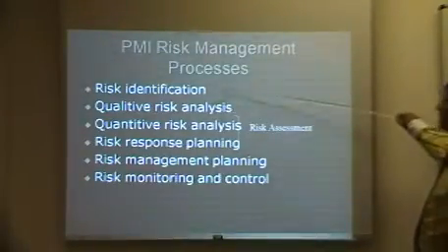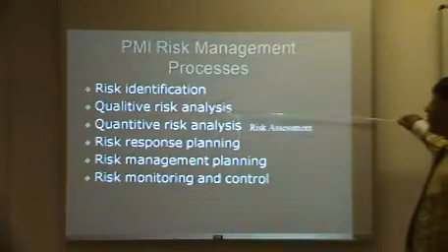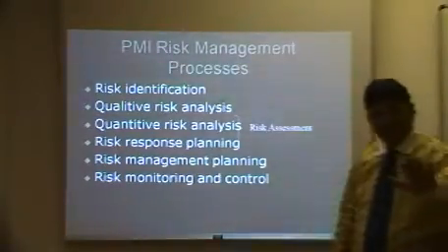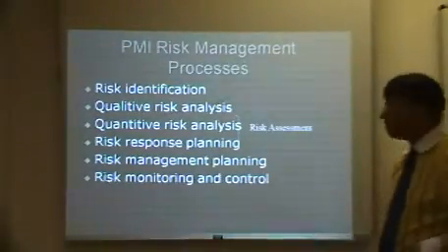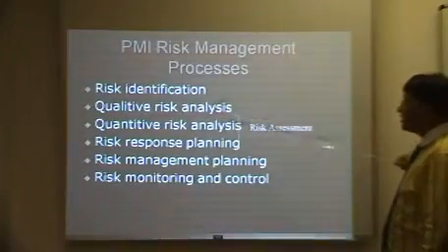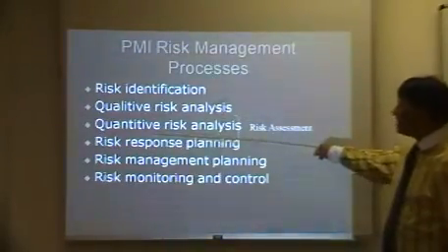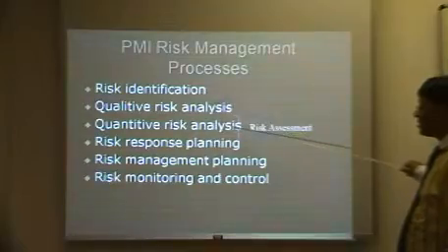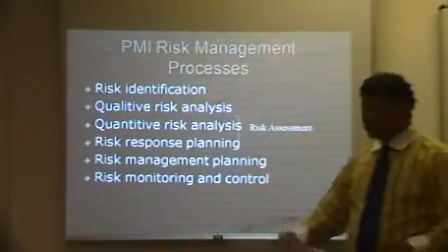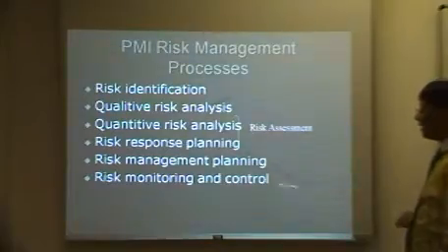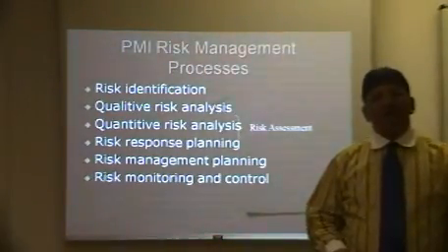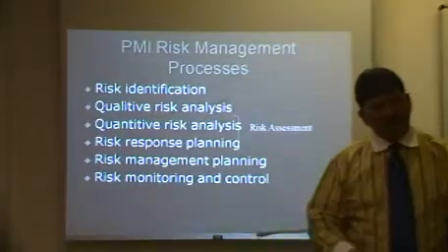Once you've identified your risk, you will then do a qualitative risk analysis. I will elaborate on that on the next slide as we move along. You will have a qualitative risk analysis process and also a quantitative risk analysis process. What follows the quantitative risk analysis process is risk response planning. In other words, if the risk happens, how are you going to respond to it?